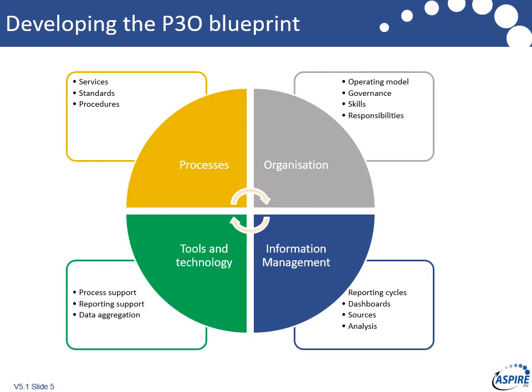And how are these tools going to do the data aggregation? So we need to be very careful. You can choose to go and buy the best in breed tool on risk, on planning, or whatever it is, and then you find that they don't actually fit together and you can't aggregate the data. So key elements of performance are data aggregation and analysis. So you need to design that into your model early on.